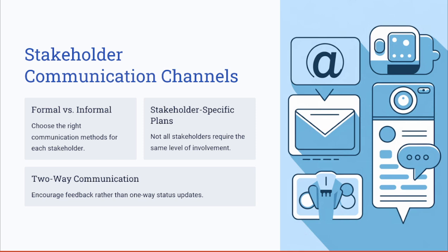The third tool here is the two-way communication concept. It works by encouraging feedback rather than just a one-way status update. It's like after you send a report or a message to the stakeholders, you might confirm with the stakeholder whether your message was clear enough or whether they need some more information to clarify one of these concepts or updates or reports or any information about the project. So this is how you enhance the two-way communication.